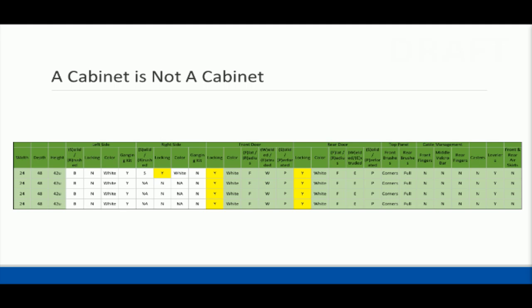First, you're going to want to bid the cabinets competitively with that low voltage, so you want a full kit together of what you need. You also want commitments to the unit prices for the cabinets as part of your initial procurement, so if you do miss anything, when you go back and buy it, you're getting it at the price you negotiated, not 10 times the price you negotiated. So it's really important to do this sort of detailed analysis up front of what's going into the data center.